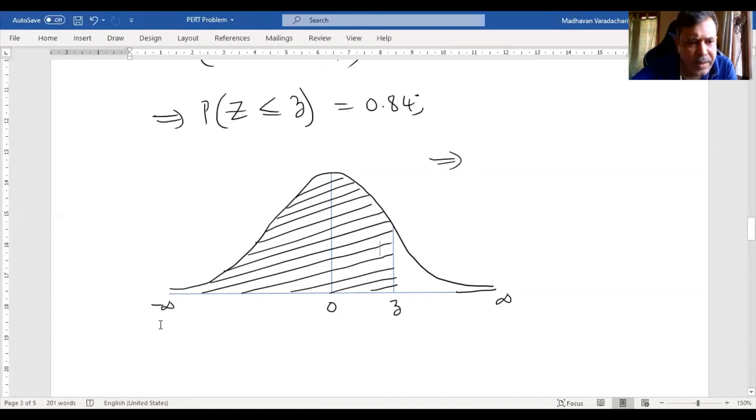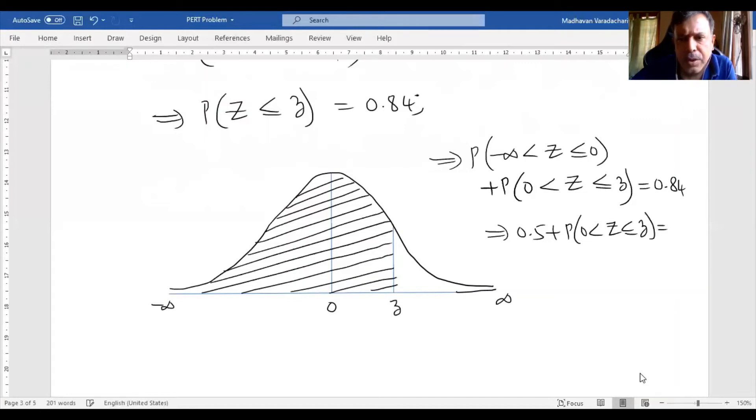This area is going to be shaded towards the left because it has a less than or equality sign. That area coverage is around 0.84, which is 84%. This has to cross 50%, so I should plot that z value after 0. This area which is 0.84 can be split: probability negative infinity to 0 plus probability 0 to small z equals 0.84.